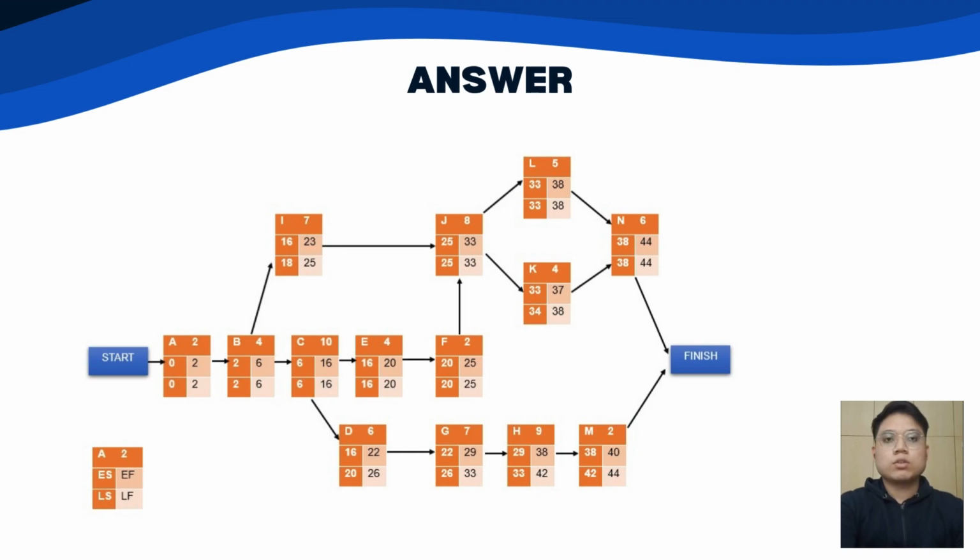Okay, next, to find the latest start and latest finish, we must put the column N and M latest finish 44 because the critical path is 44. So for both columns we do the minus operation with the numbers already given, as shown in the equation diagram.